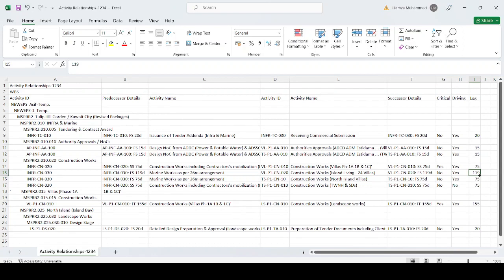This is a good method to check the health of your schedule. A schedule with too many excessive lags raises a big question mark about the health and accuracy of the program. You can ask your supplier or subcontractor to address this, or if you created the program yourself, find ways to reduce the lag.